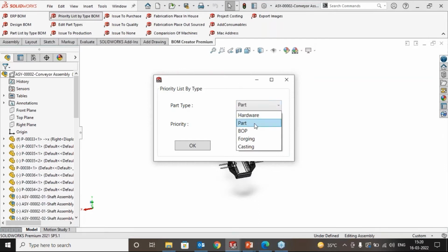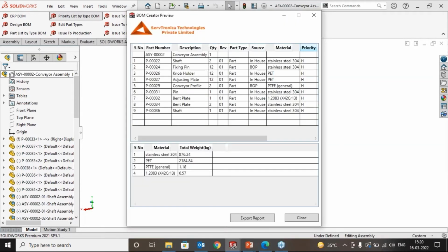So here we help you plan the project activities. Let's say we are categorizing this information in high, medium, low category, right? The items with high category are the items which have higher manufacturing lead time. Items with higher manufacturing lead time need to be considered first for my manufacturing activity, so that I can have more buffer time.